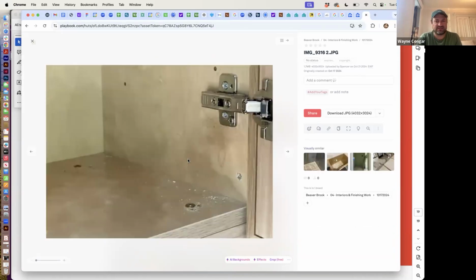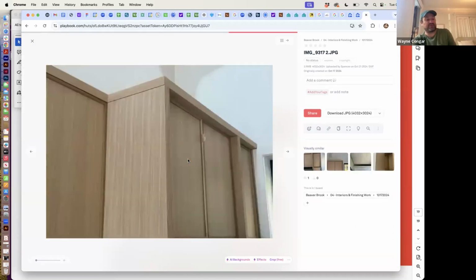And I think it's important for our clients or any prospective clients out there to recognize that on all of our projects, we're not going through the design exercise, handing it off to a contractor and saying good luck. We are entering into an owner's rep phase during construction. We're there on the ground at all these key milestones of construction, at siting, at initial excavation, at foundations, at framing, at mechanical, electrical, plumbing rough-in, all the way through to moments like this